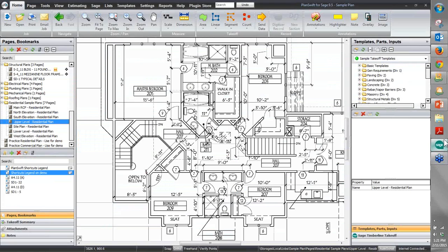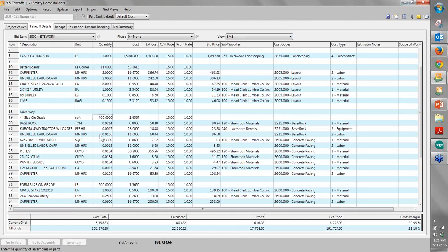So we can come into the plans, do a takeoff, do my area takeoff, color, do a quantity, a linear, area takeoff, cubic yard, whatever it might be, and take this information and feed it right back into our system where that 400 square feet goes in. So that now I can do takeoffs with PlanSwift, have it feed all those quantities in the Sage 100 Contractor, and then I can finish off my estimate.